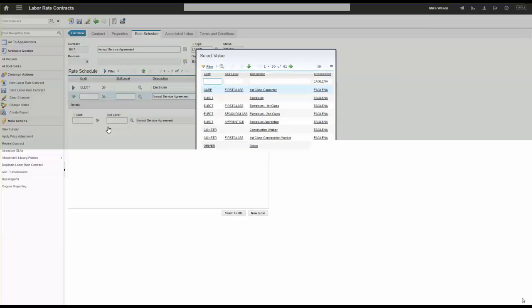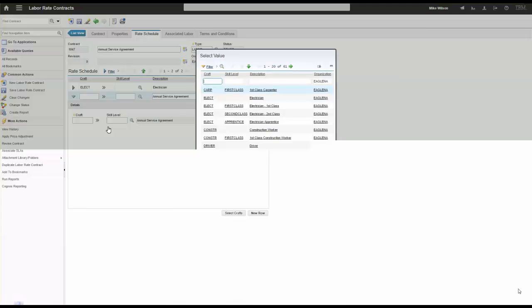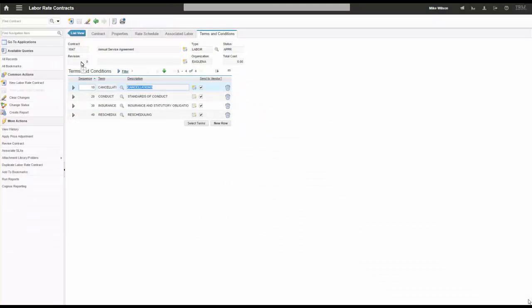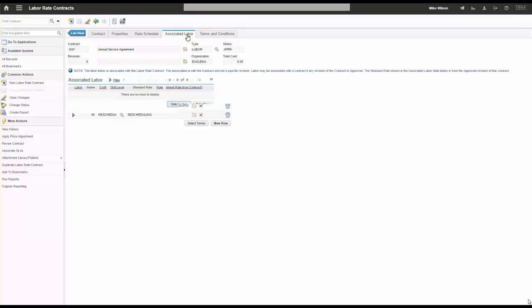I'm going to approve this contract, taking it from draft status to approved status. You'll notice revision zero here — over time, once the record is approved, we can't add new rate schedules or terms and conditions, but we can revise the contract if jointly agreed, and Maximo will track that. Now I'm going to associate specific labor to this contract.